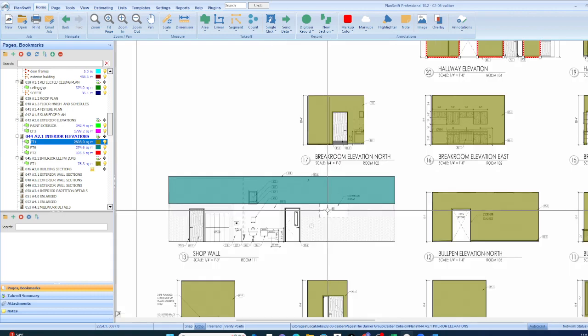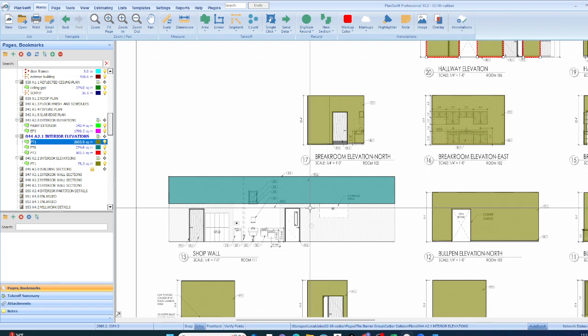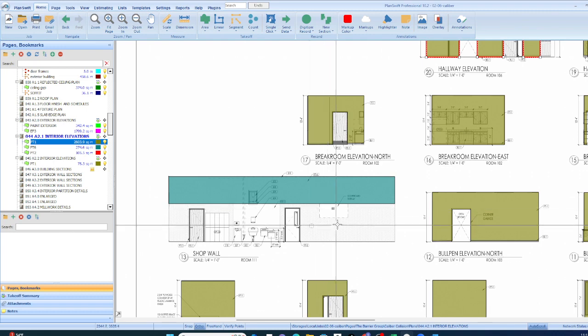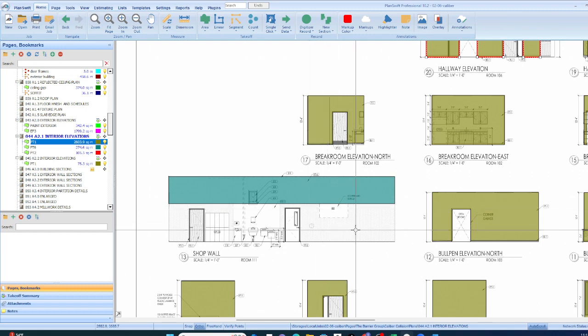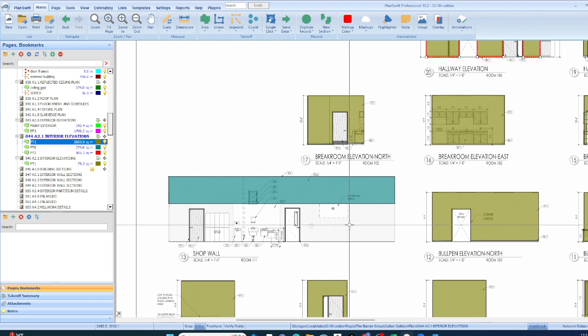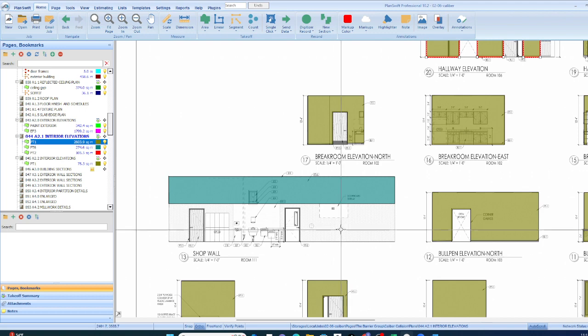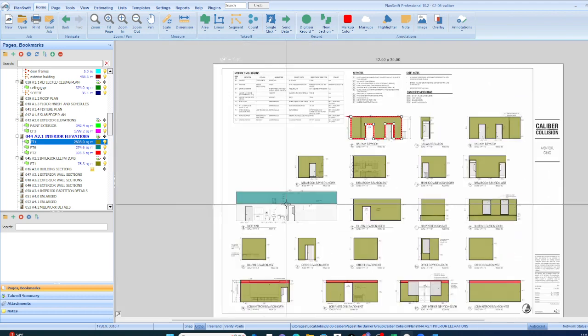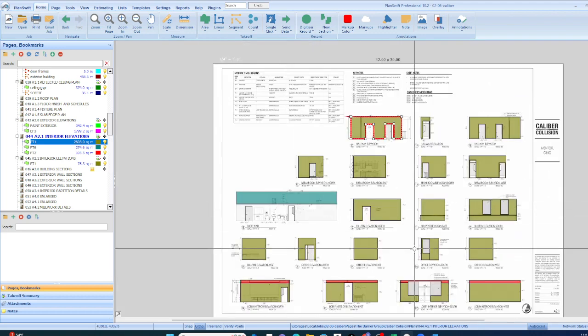And so for painting, you'll assume that the walls are being painted, the ceilings being painted, doors are being painted, and door frames have to check very carefully. And I never included, I excluded window framing if that's being painted, but you can look at the specifications. And sometimes HVAC is being painted, pipe is being painted. And so that's why it's always important to look in the specifications first, no matter what your trade.